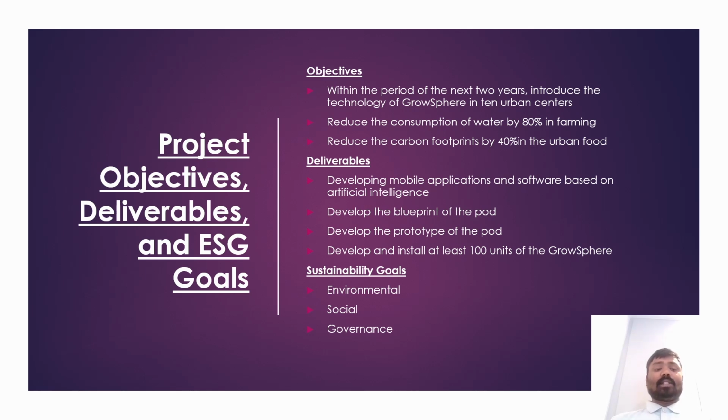And the fourth one is project charter approval, including an ESG scorecard that must hit at least 85 points to proceed. What's key here is the ESG scorecard decision gateway, a diamond on the map requiring a cross-functional sign-off. If our scorecard does not meet the threshold, we pause to refine objectives or adjust scope.